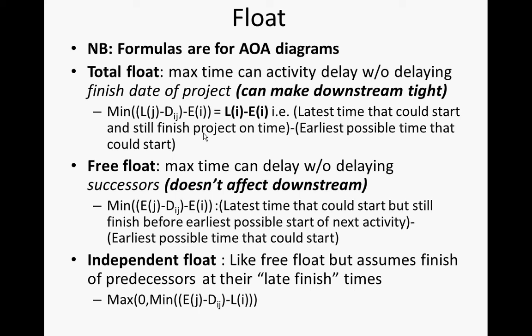By contrast, this task here can delay by a day, and it's not going to delay this by a day. There's no one that's going to be directly harmed. So this one actually has 4 free float and 4 total float. By contrast, this guy here has 4 total float, 0 free float. Okay. Anyway, there's an example in there which illustrates this.